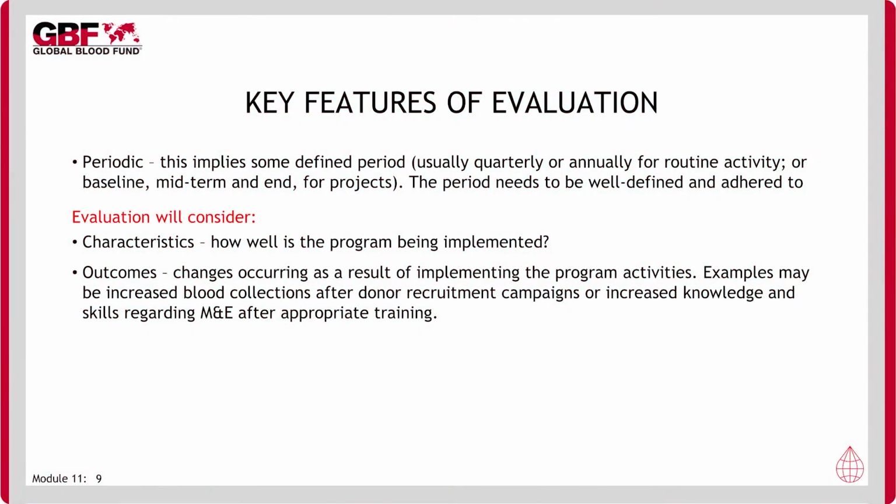The periodic requirement implies some defined time frame for routine activity. This can be quarterly or annually. For specific projects, you will generally need a baseline assessment against which you will determine progress, then further evaluation at the mid and end points.